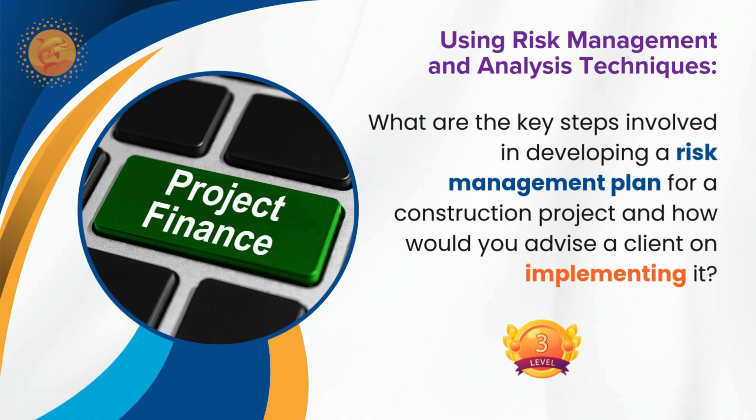Okay, sir. Yes, you can add, please. To develop the risk management plan, first I want to identify the risk and prepare the risk register. After that, evaluation of the risk. What is the impact of the risk? Probability and impact according to the impact matrix. And after that, we set up the risk response plan